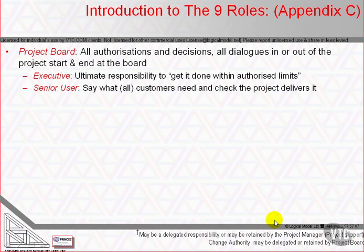The senior users specify the benefits and are eventually held to account by demonstrating to corporate or programme management that the forecast benefits, which were the basis for the project's approval, have actually been realised — a duty likely to require a commitment beyond the end of the project.